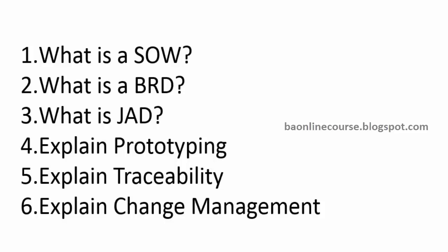Okay. After that, what do you do? After that, there would be analysis. Right. After that, we would need a justification why that change is required. Okay. After that, what do you do? So the change would impact the budget and the timeline, so we need to find the impact of it, you do impact analysis. After that, who will decide? Will you decide to take up a change or not? No.